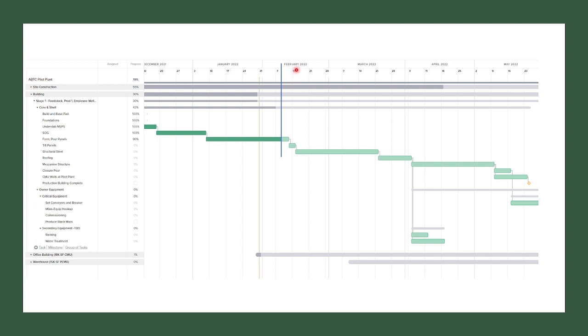So if we tilt up the panels within a week, we're still a week to a week and a half ahead of schedule according to this chart here. And that puts us right on track. So hopefully we see tilt-up walls this upcoming week, and then we'll start seeing some steel move around. So it should get even more exciting out there.